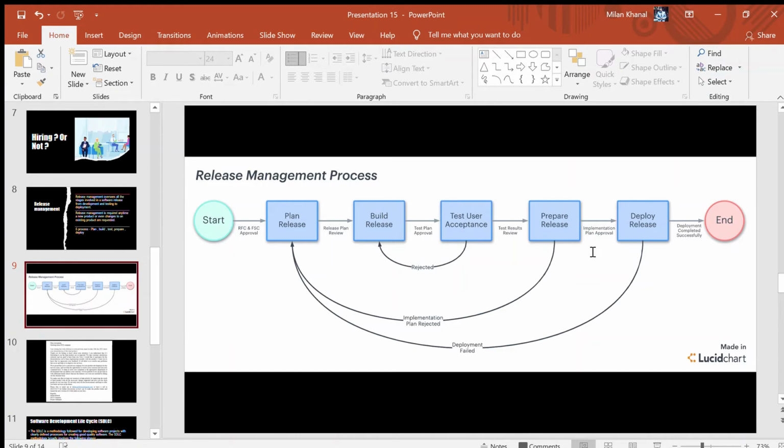There are multiple ways to map out your plan and clarify the process. One option is a release management checklist. If we follow this checklist, once your plan is scratched out, present it to all the stakeholders, and once they give their feedback on any gaps or problems they see in the requirements or the scope, then once the plan is approved and finalized, you can put it into action. So this is how the plan release is important.